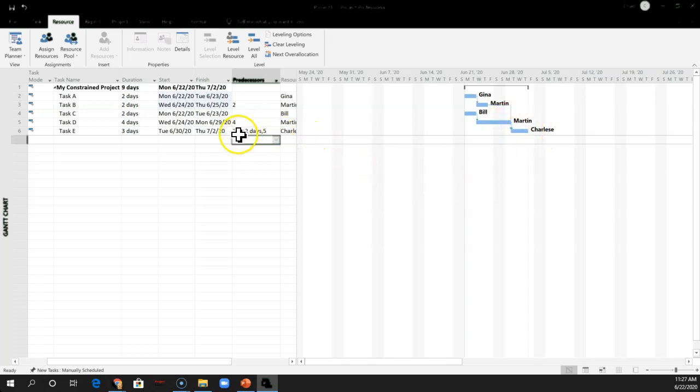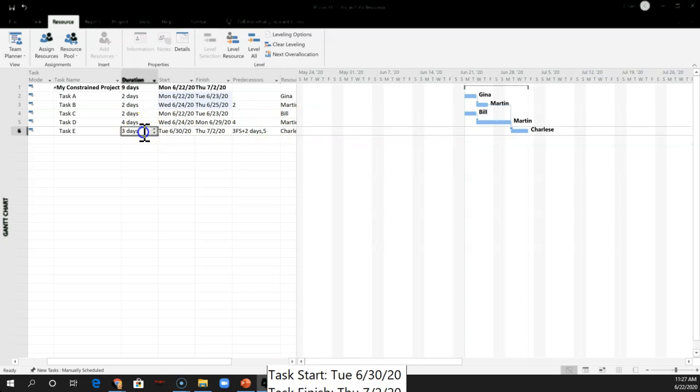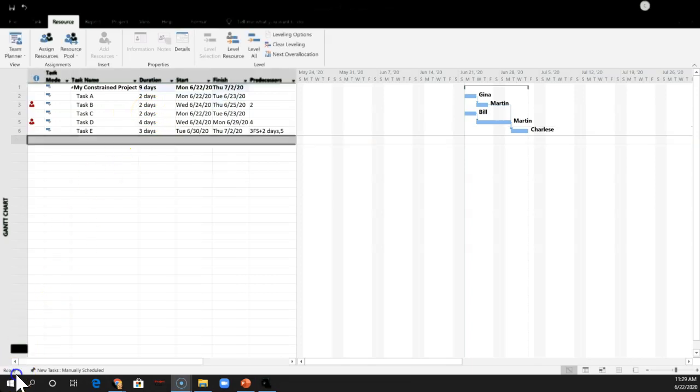We're also going to put a buffer on the entirety of the schedule. So for the endpoint, we'd also have to add a buffer. And the buffer was 2 days, 4 days, 3 days. Add those up: 6, 7, 8, 9 days.